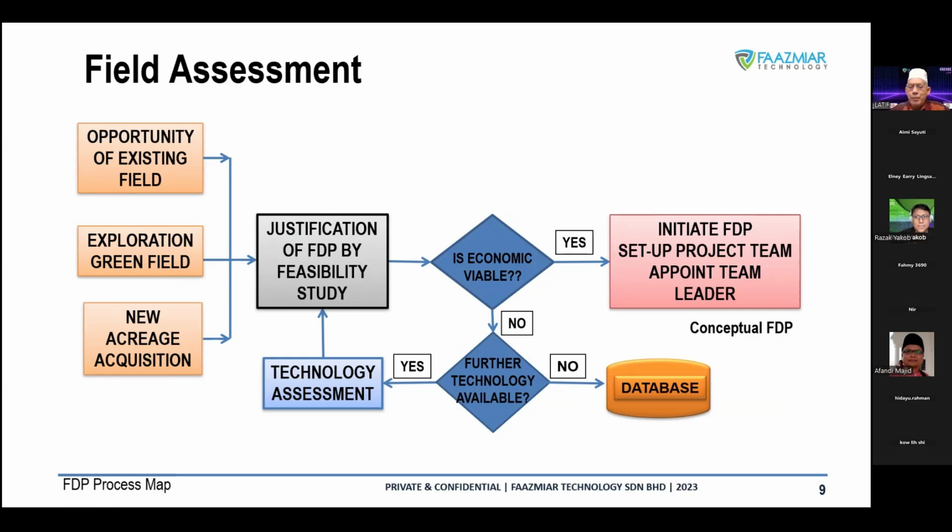So once you have the appraisal done, then we try to do some economics, try to see different scenarios. What if I have a big reserve? What if I have a small reserve? And so on. Then once you have the scenarios, you find out what is the missing link. What are the information that you need to improve to be able to accurately estimate your economics.